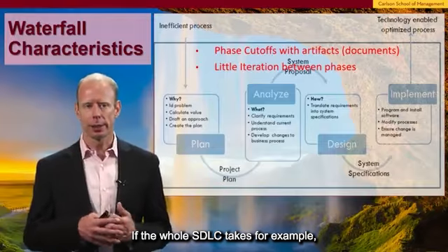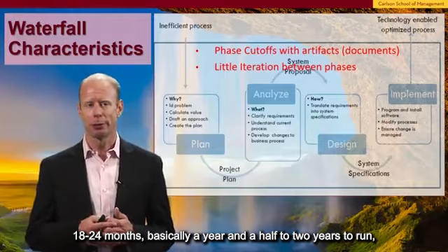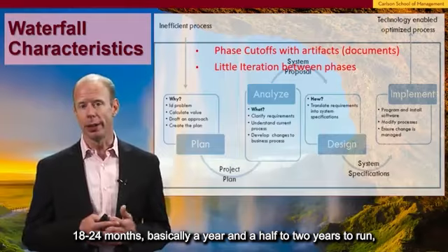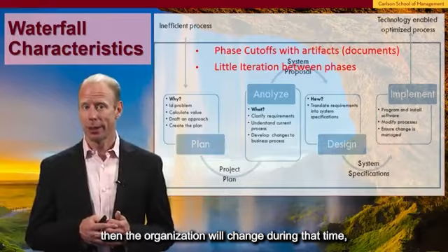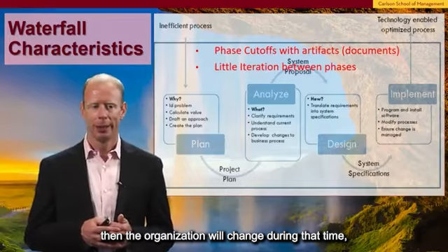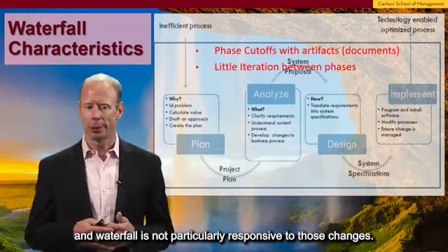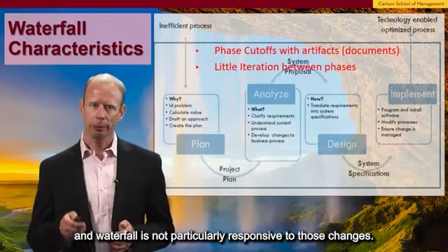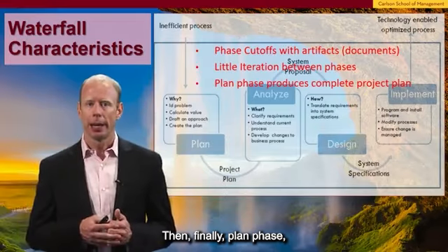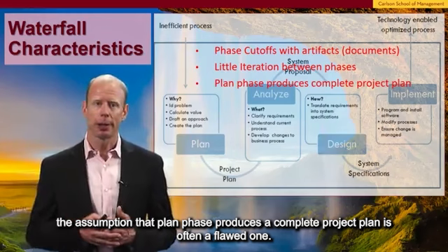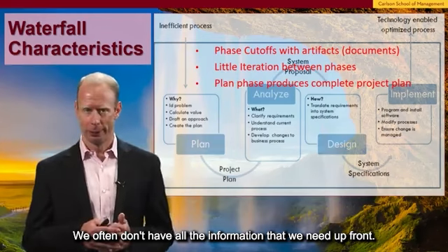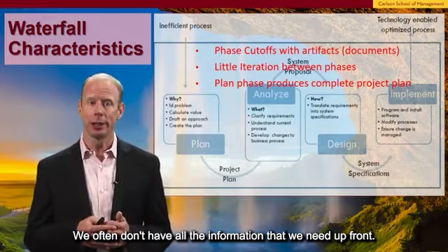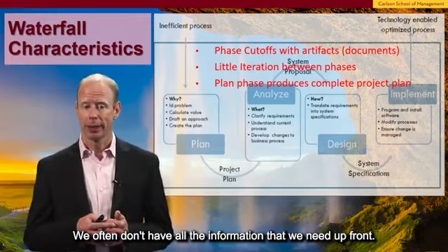If the whole SDLC takes, for example, 18 to 24 months, basically 1.5 to 2 years to run, there's a good chance that the business environment and the organization will change during that time, and waterfall is not particularly responsive to those changes. And then finally, the assumption that plan phase produces a complete project plan is often a flawed one. We often don't have all the information that we need up front.